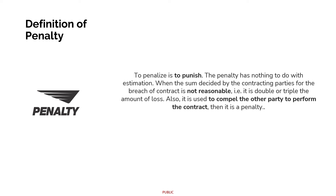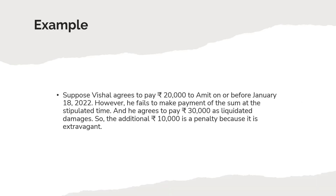The definition of penalty: a penalty is meant to punish. Penalty has nothing to do with estimation. When the sum decided by the contracting parties for breach of contract is not reasonable — for example, it is double or triple the amount of loss — or is used to compel the other party to perform the contract, then it is a penalty. For example, Vishal agrees to pay 20,000 to Omit on or before January 18, 2022, but fails to do so and agrees to pay 30,000 as liquidated damages. The additional 10,000 is a penalty because it is extravagant.